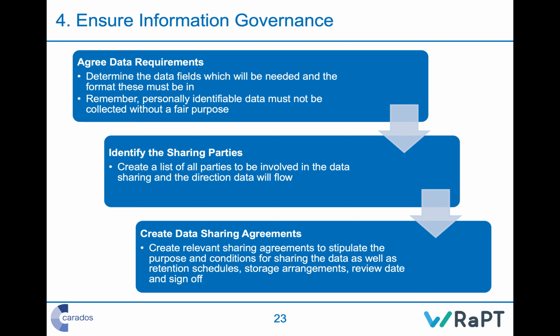Now, information governance in reality basically means that you must have a reason to collect any data that you're going to use. You've got to process it safely. You've got to be able to have plans to delete it when you don't need it anymore. I think there are 8 separate requirements which your information governance leads can help you with.